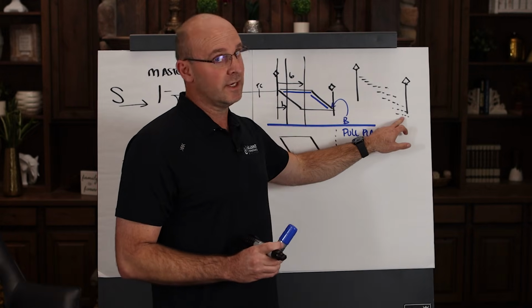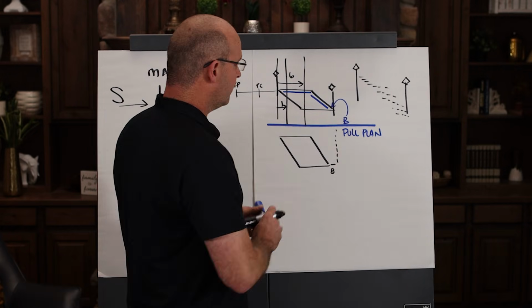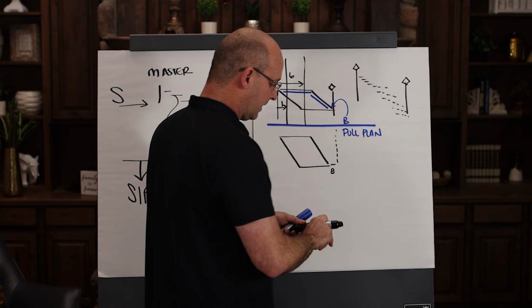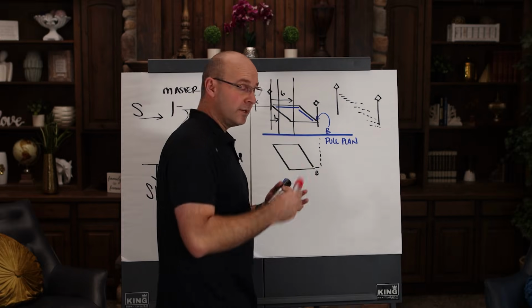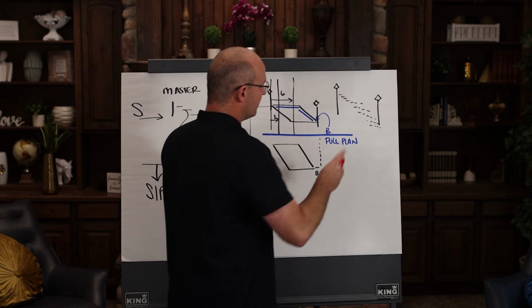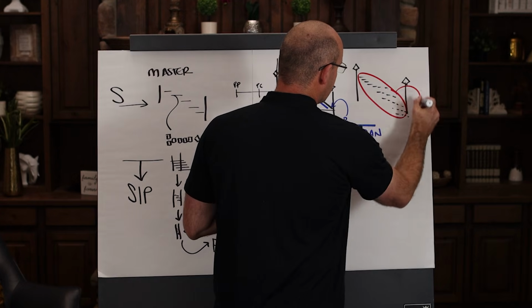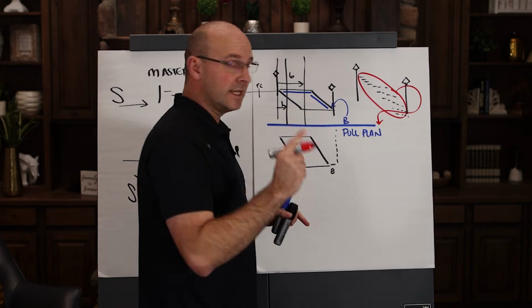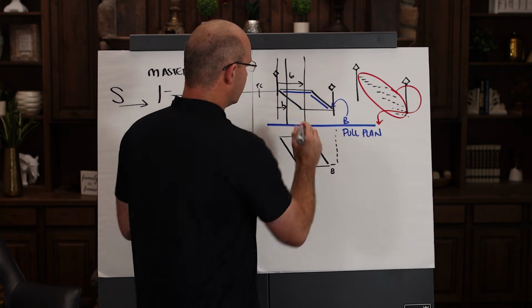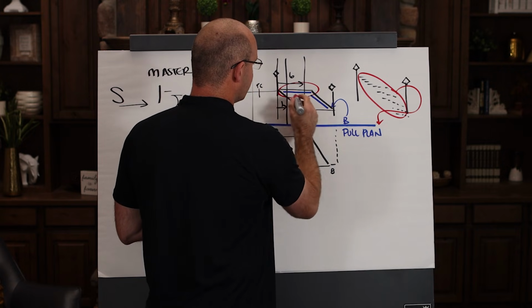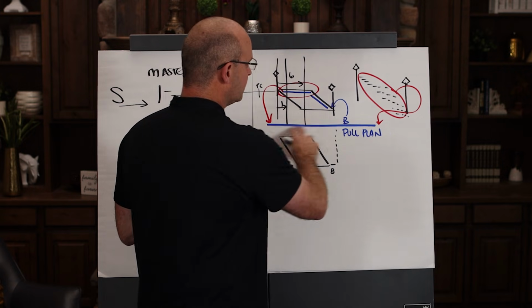So this milestone may not be set right, but if you're about to do this pull plan from CPM, and let me grab my red pen here, you're going to grab the sequence so you can then pull it into your pull plan. Just like in takt, but in takt it's better, you're going to grab this sequence for one zone and use that in your pull plan.